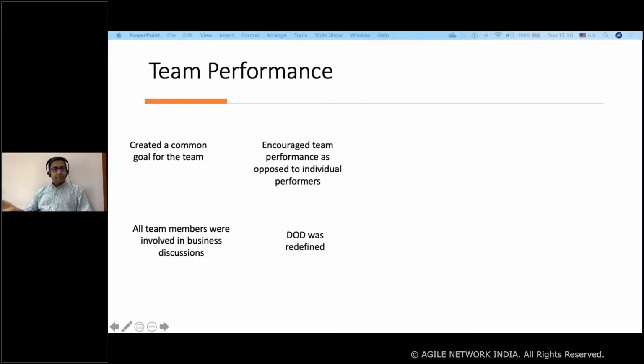So automation was brought within the scope of the agile team and within the scope of the sprint. And in some cases, mid sprint reviews were introduced, so that whenever the team is ready, they can get quick feedback. We'll have a quick session with the business and product owner to get intermediate feedback, so that they can take corrective action.